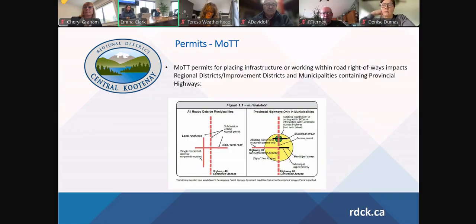Specifically, if we got into a situation where we're not looking to restore somebody's retaining wall or a major structure, things like that, in those cases we typically just work with the homeowner and pick an alternate site for the installation of that meter to avoid that area that is non-restorable, so to speak.